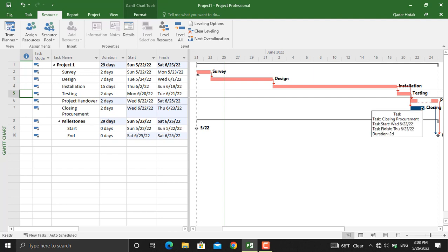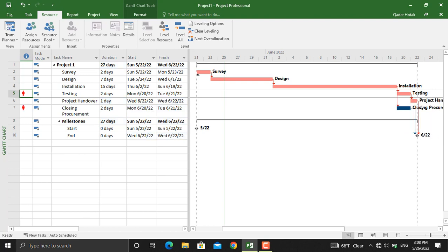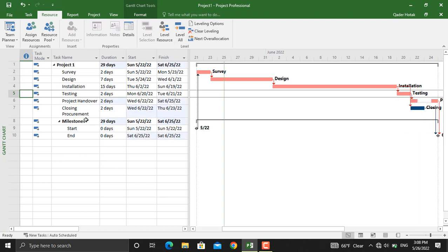Next, level all. Since we only have a conflict with Alex, the same thing appeared by level all and level resources. If this problem was with different types of resources or different resources, this would have been different. I will undo this as well.